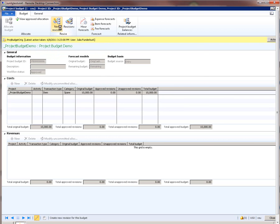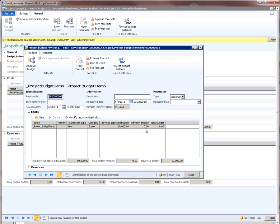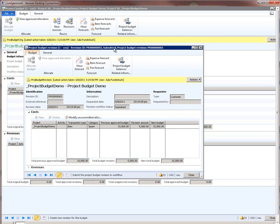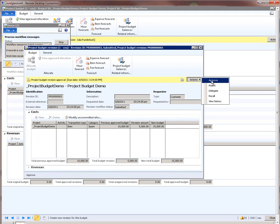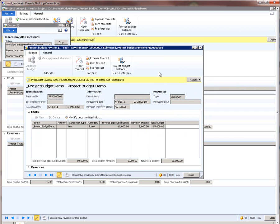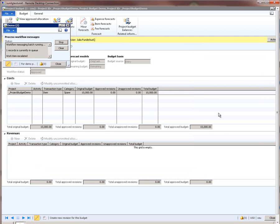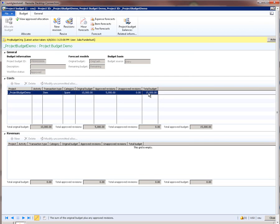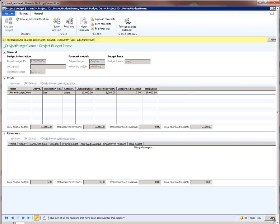Now let's create a new revision. I click on the new revisions button, which brings up the new revision form. In this form, I say I want to increase the budget by $5,000. I submit this revision to workflow and approve it. Once workflow processes this, the budgets will get committed. If I do a refresh, we see that the total budget is now $15,000, of which $10,000 was the original budget and $5,000 is the revised budget. This is how we do revisions.